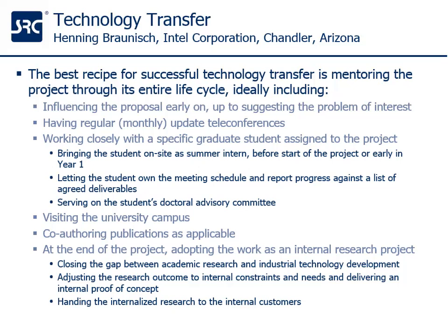But now, when it comes to the end of the project, so typically the last year of the project, we do want to have a clear focus on technology transfer. Actually have deliverables in the project that specifically target that. So in my case, for modeling and simulation, what we have often done is, for example, create demonstration computer code, something that could be transferred to the company to demonstrate it.